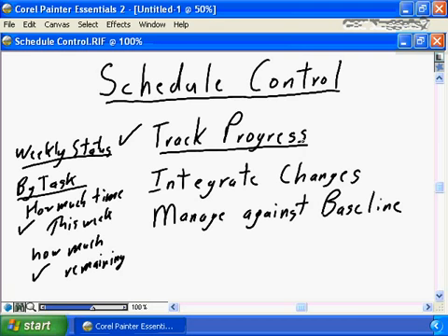It's your job to ensure that you're getting the information that you need to track the progress for the project. You need to tell the team members they have to provide this information to you. They need to provide how much time they spend on each task, and they need to provide their best estimate for the remaining work to be done by task. Team members are going to say, but this is going to take hours of time. You're going to take 4 or 5 hours out of my work week just to provide your weekly status report.